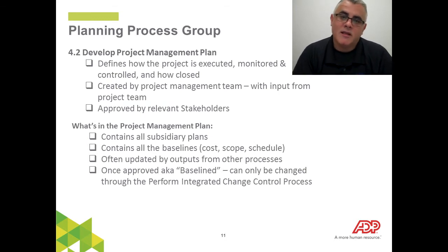Okay, moving right along, let's go into the next process group. This is the planning process group under project integration management. This is where you are going to develop the project management plan. So, as I had spoken about earlier, all the other knowledge areas are going to be developing a little plan of their own, and those are considered subsidiary plans, and those roll up into the master project plan.